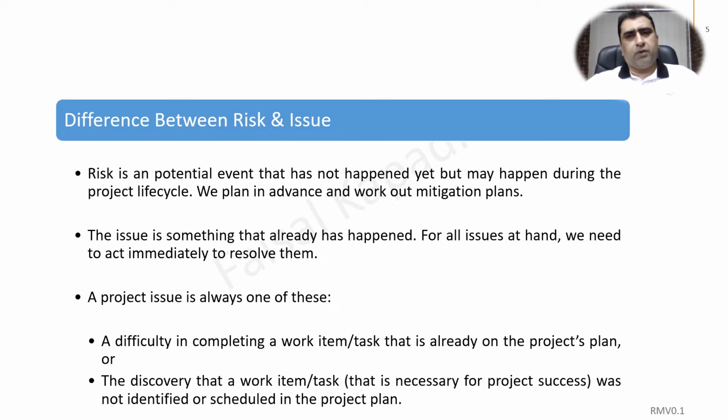So when we talk about issues, they are always one of these. It can be a difficulty in completing a work item or task that is already defined in the project plan. Or the issue can be the discovery of a particular work item or task that is necessary for project success that has not been identified or scheduled in the project plan.